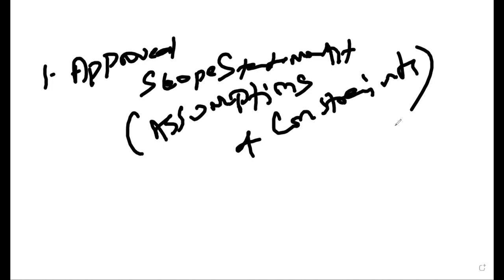If you are not revisiting or revalidating your assumptions, definitely your project will be a major victim for failure. Many mega scale projects are not able to revisit the assumptions, so the project went for a failure. So always make sure that you revisit your assumptions. And if the assumption which you made long back is proven false, then it is going to add risk to your projects.